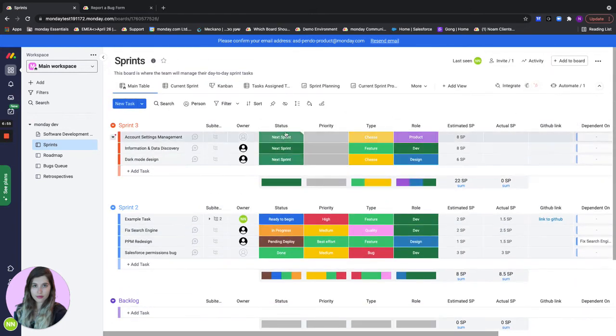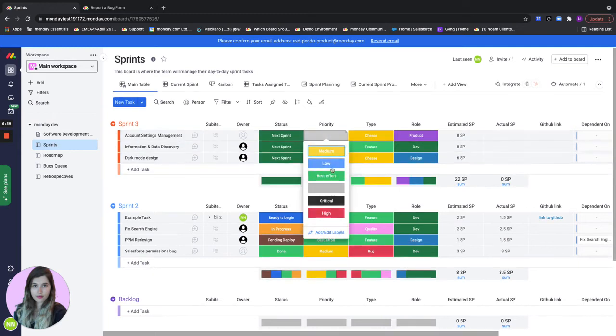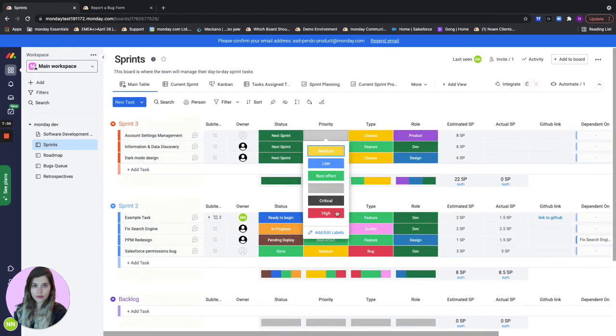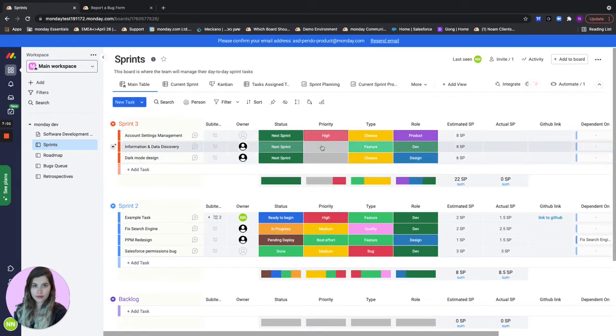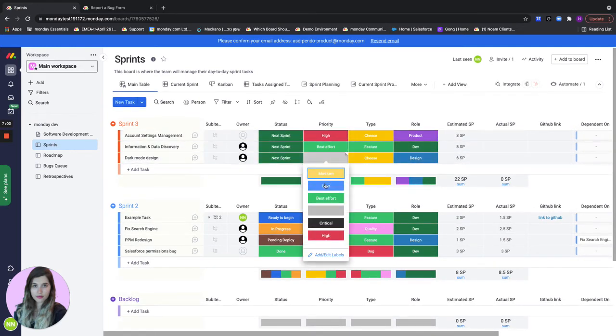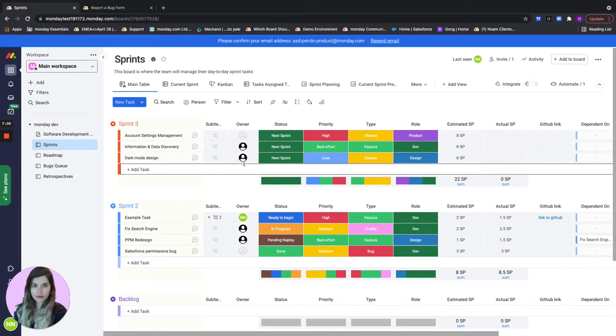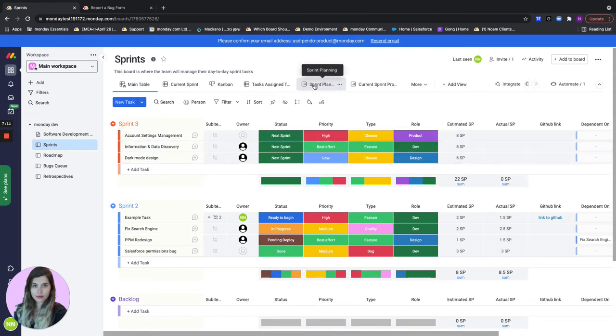Once I've chosen the items I want to make sure they all have estimated story points. I want to make sure that everybody has priority and I want to make sure that everything is assigned. But how will I know who to assign the tasks to based on my team's capacity? This is what we have our sprint planning dashboard for.